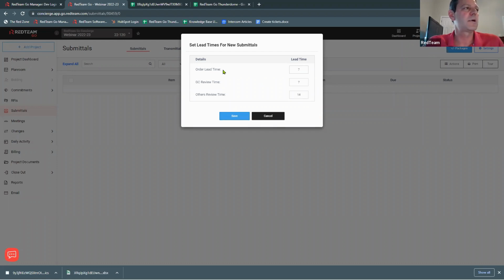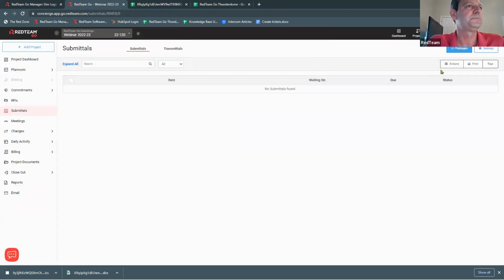So this is the order lead time. From the time you place the order, how much lead time do you need until the order is shipped out or received? GC review time. Once I get the information, how long do I need to take to review it? And then the same thing for the others. How long are they going to be? How much time do we give them to review this before we require it to be due? We're going to save those.